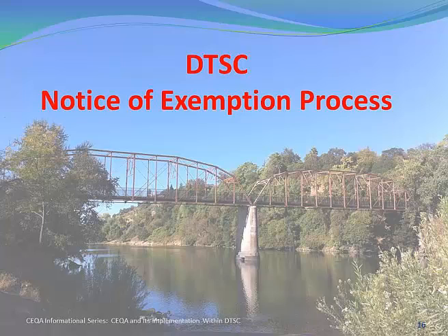You need to consider whether or not the project causes an adverse effect. The significance level triggers an EIR or a mitigated negative declaration. So you don't have to only consider effects that are significant, but you have to consider effects on that sliding scale, as I said before, from 0 to some level of effect.